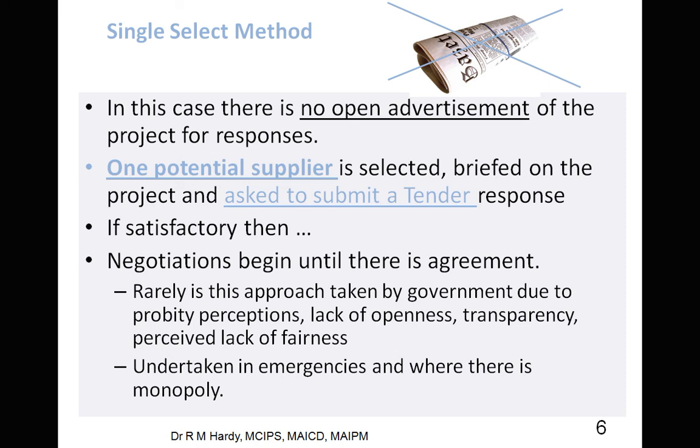So you as a builder, if you're going to answer a tender, then you will know what the form of contract is going to be, because different forms of contract require different levels of administration, which you go into in the next lecture, and that affects the price. So yes, we'll come back to that in the next lecture.